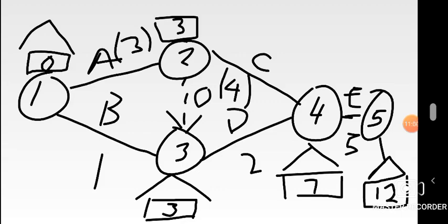And they said for 5 to start, it should be 12. And the network also ends on 12. So basically, the latest completion time is usually equal to the earliest starting time. Take note of that. It's always equal to the earliest start time. So in that triangular shape now, we're starting to fill in latest completion times. That triangle we've been drawing on top, which makes a heart shape. So let's put 12 there. A small 12 you've allocated.